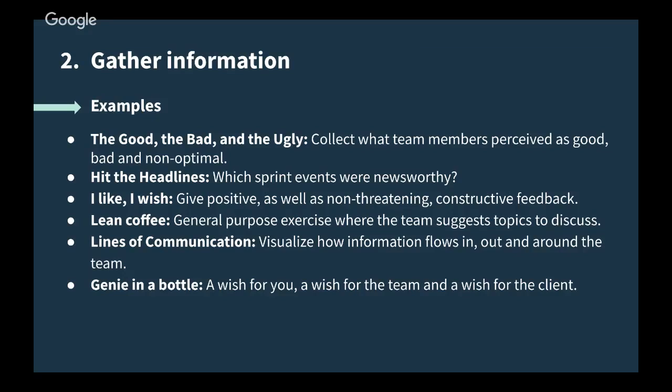How they think the information flows between each other, the client, the project managers, and any other stakeholders involved in the communications. And this will show you bottlenecks, unnecessary communication flows, redundant information, where information gets lost. And this is a great dynamic for that.